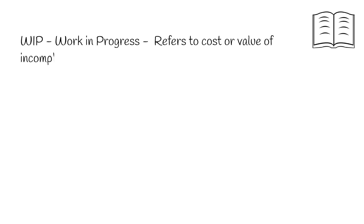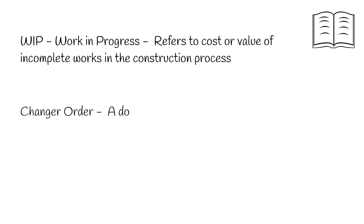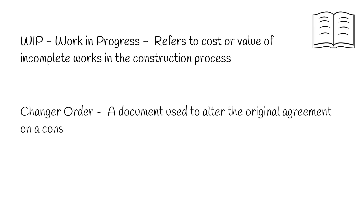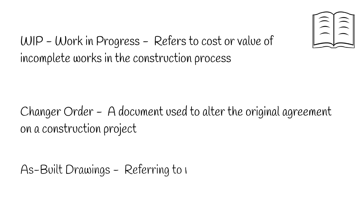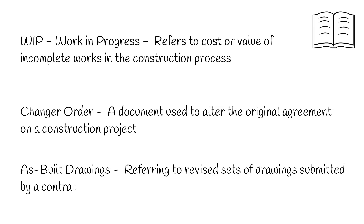Term 22. Work in Progress or WIP — refers to the cost or value of incomplete works in the construction process. Term 23. Change Order — a document used to alter the original agreement on a construction project. Term 24. As-built Drawings — referring to revised sets of drawings submitted by a contractor upon completion of a project.